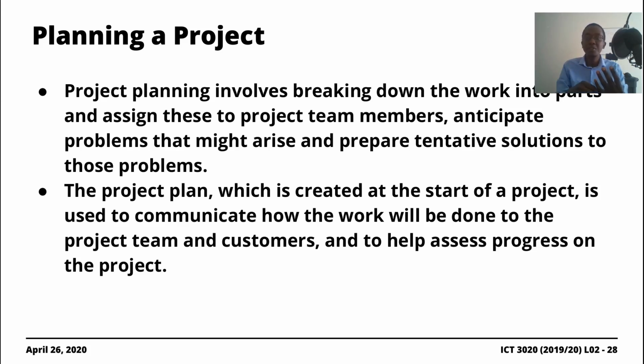So perhaps team member A would be assigned the implementer role. Participants 2 and 3, or B and C, would be assigned the designer role and perhaps the tester role, right? And so these things we're calling parts or tasks would be assigned to the roles, and then participants are attached to the roles.